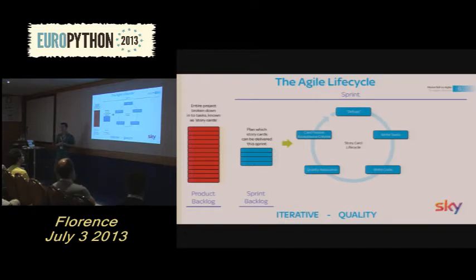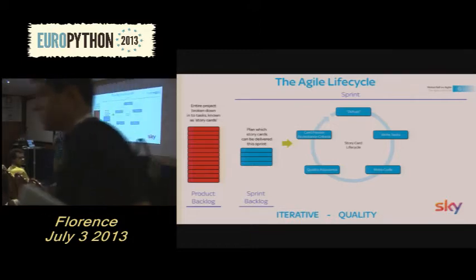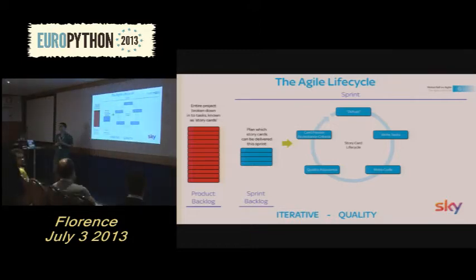Every single one of those story cards will go through this story card life cycle. It will start with a defuzz, where the development team will discuss with other members of the team and nail down the exact requirements for this task. The development team, along with the quality assessment team, will then write tests together and then write the code to pass these tests. Then only when the card passes specific criteria, called acceptance criteria, we then say that this card is done. And this card is then ready to be released at the end of the sprint.